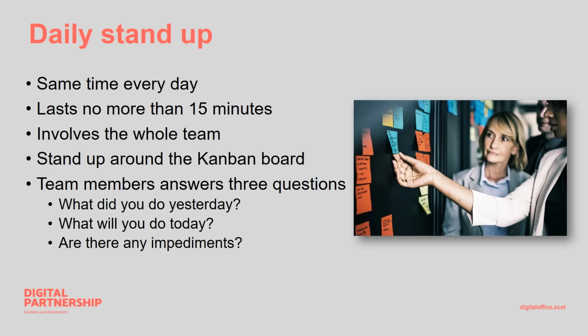Now, the daily stand-up, when I first heard about them, I thought every day that's a lot of meetings. But we gave it a go, and I'm now an absolute convert to them. I think the benefits of them, even when done badly, outweigh any potential disbenefits or challenges. So how do you do a daily stand-up? Well, same time every day. Last no more than 15 minutes, and we find with our team of 4 people, it takes us about 8-9 minutes to do ours.